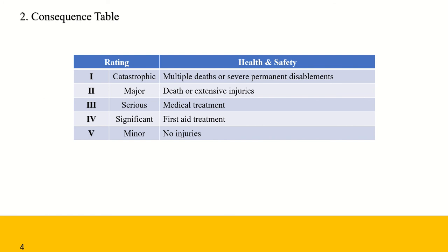Risk assessment is the overall process of risk analysis and risk evaluation. It aims at developing agreed priorities for the identified risks. Risk analysis is the systematic use of available information to determine how often specified events may occur and the magnitude of their consequences. Risk evaluation is the process of comparing the estimated risk against given risk criteria to determine the significance of this risk.